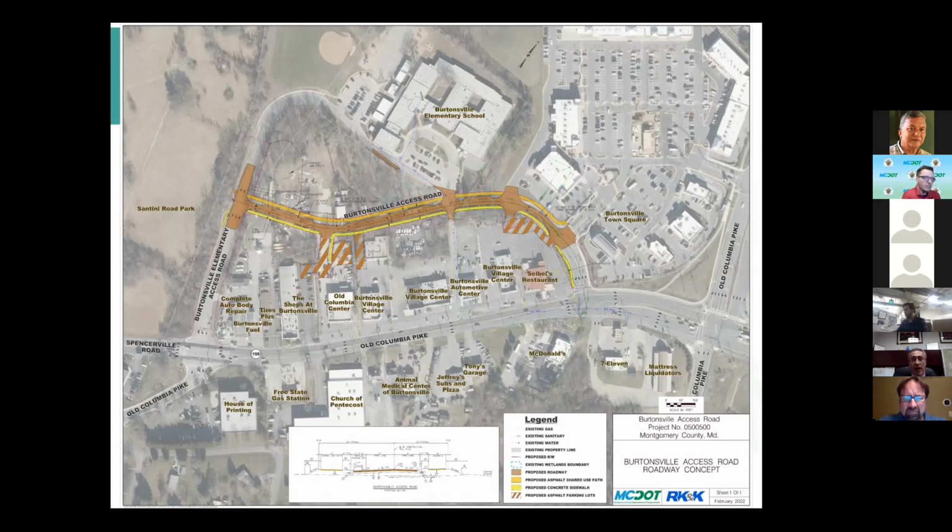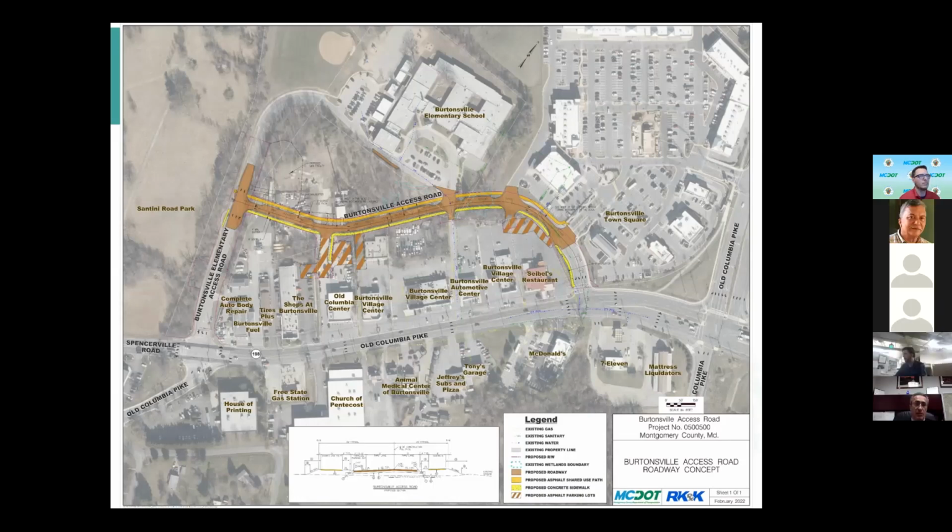It is never our practice, because the design can change, to contact property owners. We don't even have plats. We don't know that till the final design is set. We know exactly where the road is, where the drainage is, where the utility impacts are, and where the stormwater management facilities will be. For that reason, not just this project, all of them, plats are prepared at the end. As far as contacting, every contact that we had, we notified either via email or postcards for people to attend the meeting.